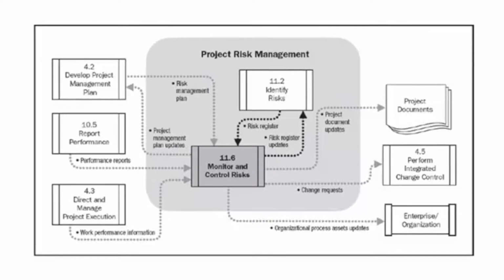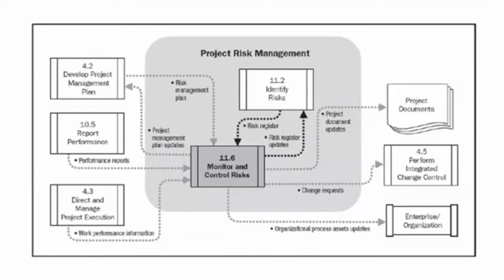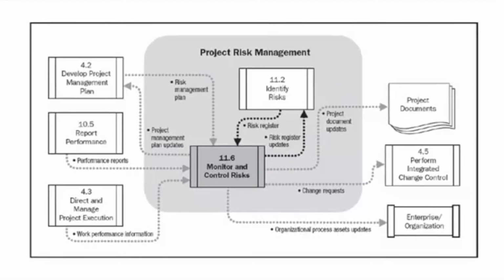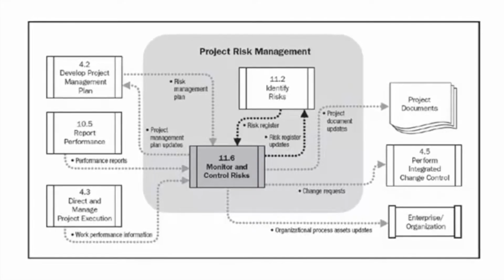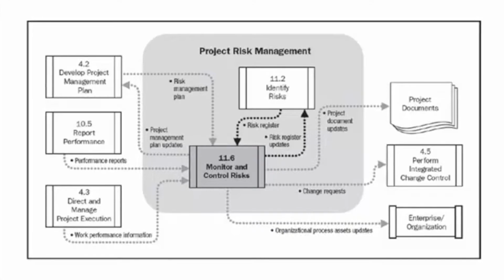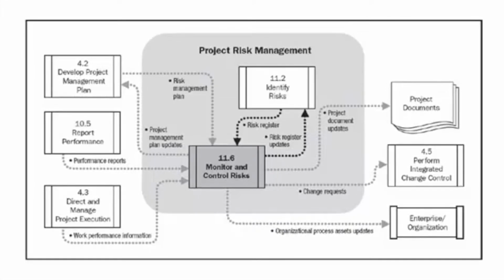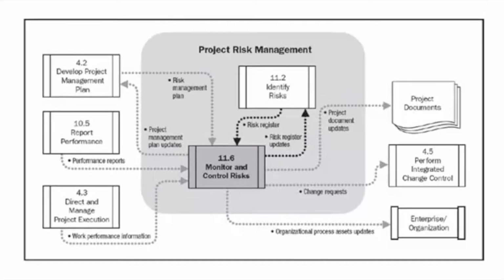And this goes back again to the risk response owner, or the risk owner, who should really be reporting to the project manager on the effectiveness of the updated plan, any unanticipated effects, and any corrections that need to be made. And they need to be recorded as well in whether it's the risk management plan or your risk register. And as part of updating the project documentation, we want to make sure that the organizational process assets for reuse, lessons learned artifacts, and risk management templates are all updated in addition to the project management plan.